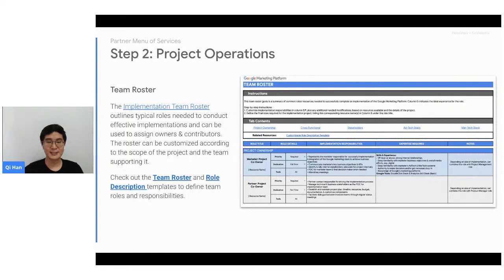For example, we recommend setting daily standups with team members, especially in the first month of the project, planning for regular check-ins with executive leadership to review progress and gain approvals, as well as maintaining a log of cross-dependencies, especially when there's a very complex web of interdependencies.